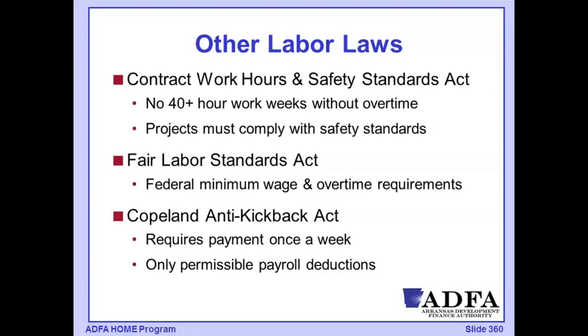Other labor laws that are going to apply: we have our Contract Work Hours and Safety Standards Act, which is related to no more than 40 hours per week being worked without overtime being paid. It also includes some safety standards. The Fair Labor Standards Act also includes some language about federal minimum wage and overtime requirements. And then the Copeland Anti-Kickback Act has requirements about payments being made on a weekly basis, but it also has some language about what's allowable as a payroll deduction.